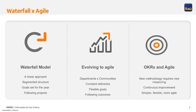In waterfall, what matters is achieving 100 clients by year-end. In agile, we break it into quarters: 25 per quarter. We have constant deliveries to reach the big goal by year-end. This method needs a flexible way of setting goals — we stop following projects and start following outcomes. We need to be flexible to change direction if something changes in our environment.